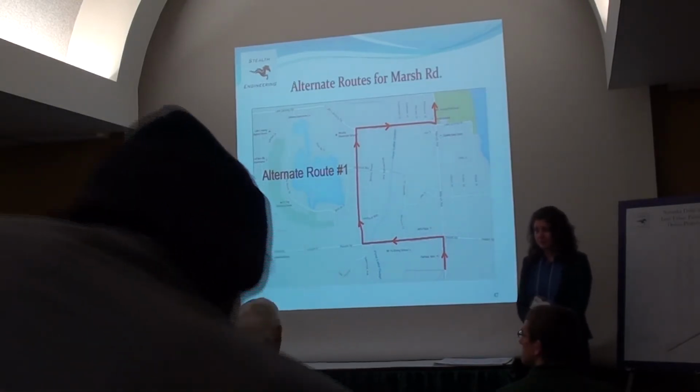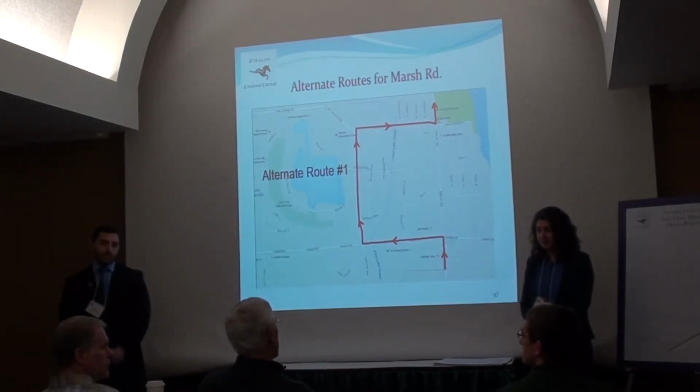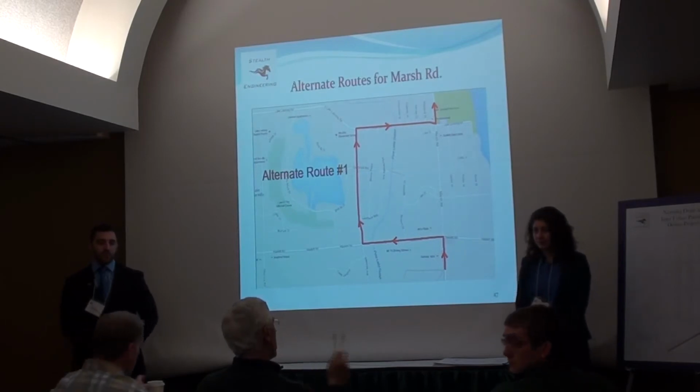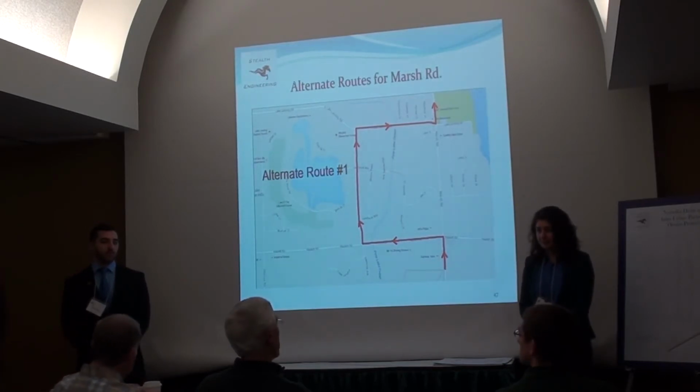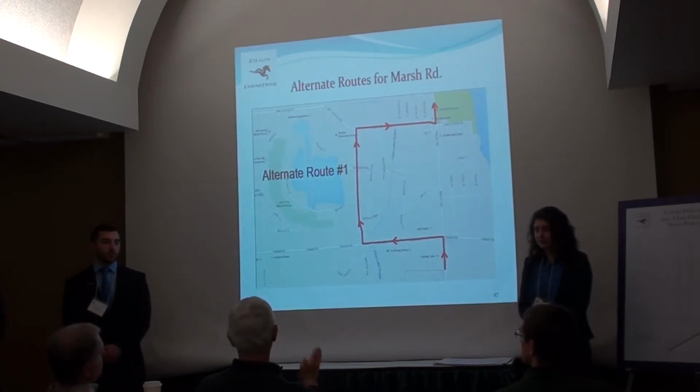Well, just as a quick aside, we, as the drain office, just built a similar thing just like this in Colton last year. And just to let you know, the sidewalk portion was a lot trickier than the swale portion, because of dodging trees and power poles.